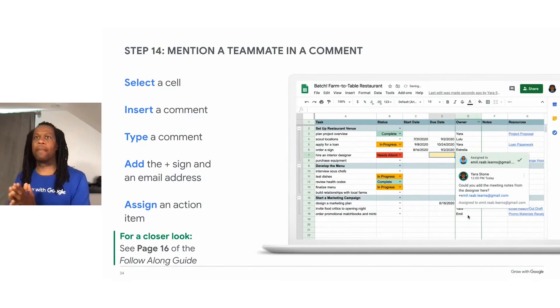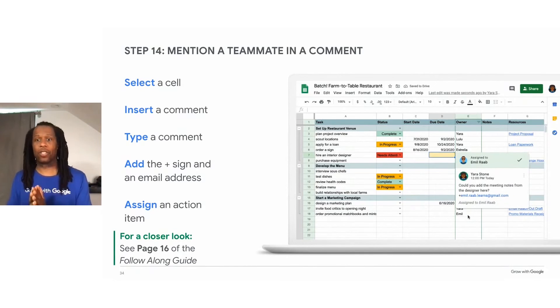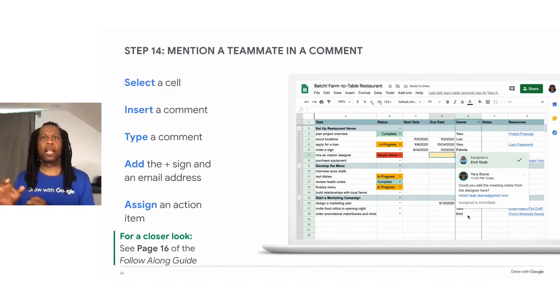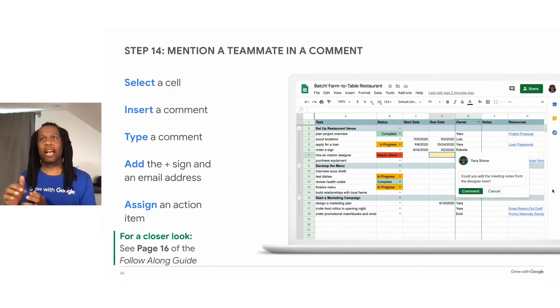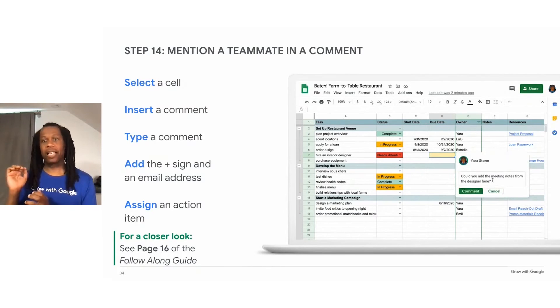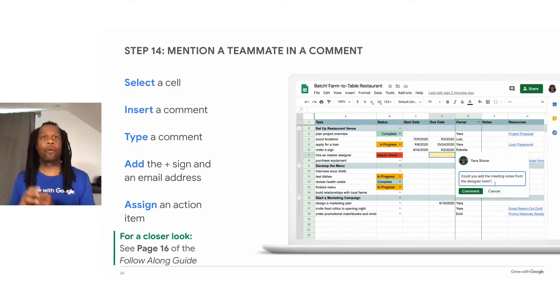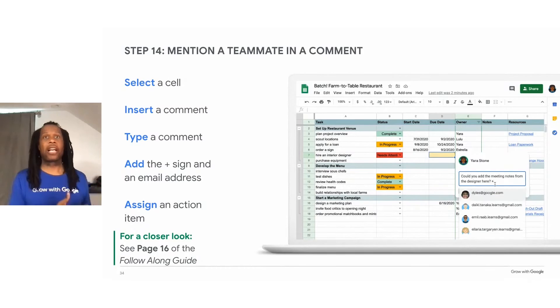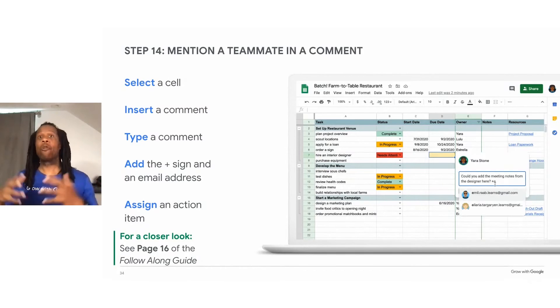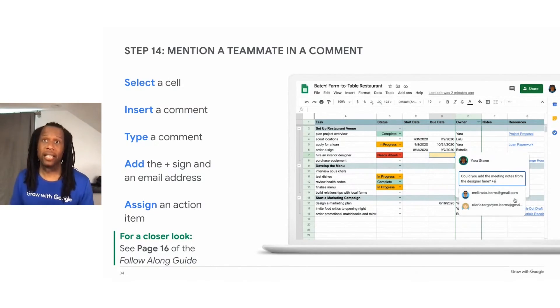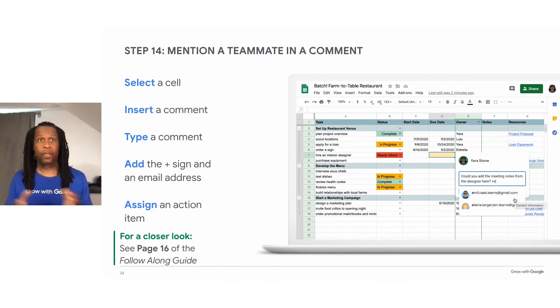If you have a specific task that you or your teammate need to do, you can mark your comments as an action item. So as opposed to just making the comment, when you plus them in, you'll have the ability to make it an action item by clicking assign. The person will receive an email with your comment and they will be responsible for completing the task and marking it as complete.